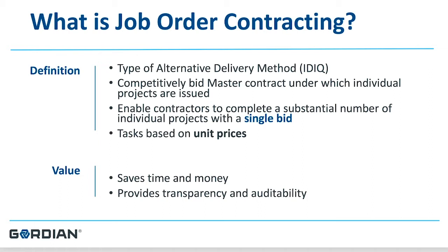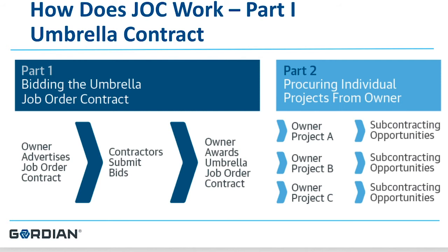It also provides transparency and auditability to the process. So how does job order contracting work? Think of job order contracting as an umbrella type of contract, and underneath that umbrella you can order lots of different scopes of work.